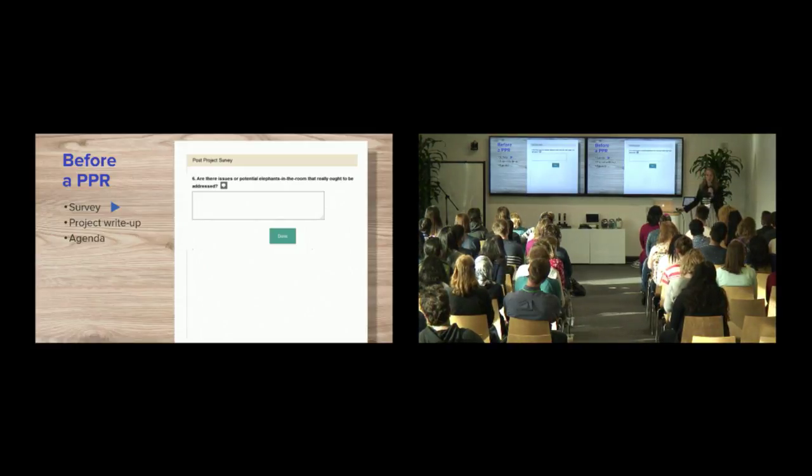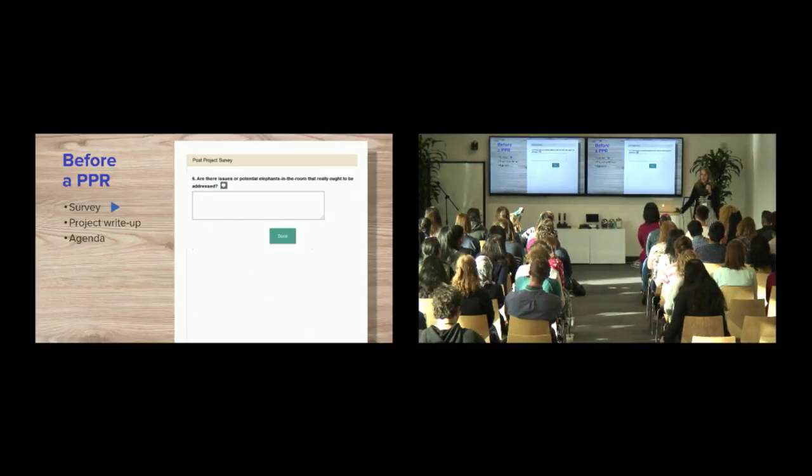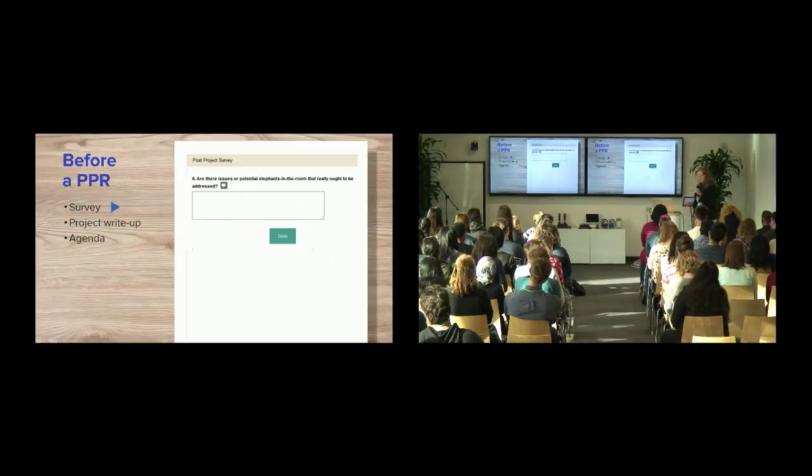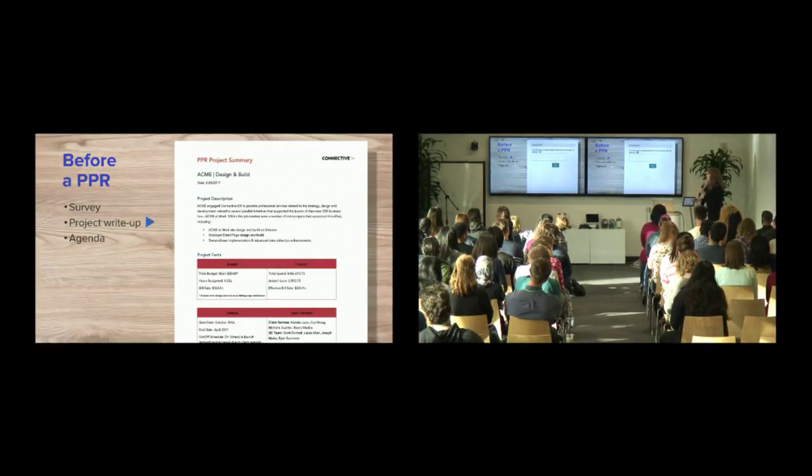Right? When you get together with a group of your project peers, sometimes it's difficult to have these conversations. And so what we do is we send out the survey in advance so that the facilitator can read through all these responses and then pepper through either pull quotes or questions depending on how the project went. Of course, we aspire to have teams that feel really comfortable talking to each other, but that's not always the case. And so having a setup like this allows our quieter team members to really have input and not let conversation be dominated by our chattier folks.